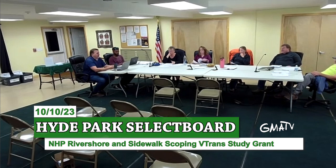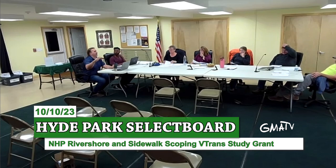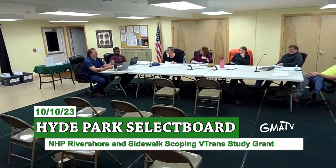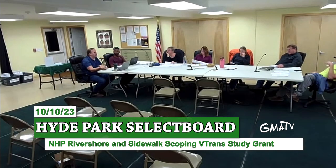Yeah, I think there was a time, including now, with a lot of highway crews where they don't put value on the lost work task. So let's say you have the highway guys jumping around to a lot of small projects without care for the plan of the road maintenance. And we got put on regrading the library lawn. Yeah. Or sometimes we'll pull Mark off and three guys are working on some shed, setting the shed. Yeah. Those are just shifting your force account money around at the expense of regular highway maintenance.